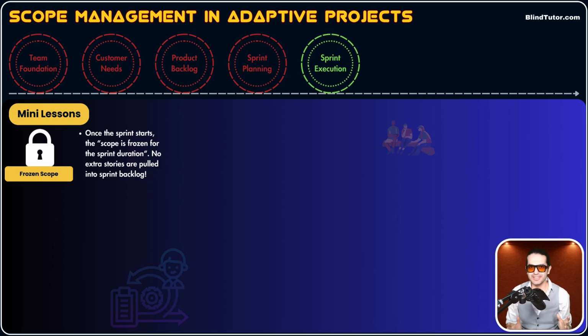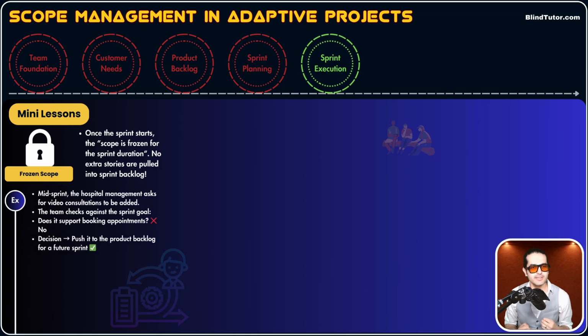Same thing is for here, for sprint backlog. It is a frozen document. Once the sprint starts, no changes to a sprint backlog. There are very, very few rare cases that, if all the team agrees, they could add a user story that is aligned with the sprint goal and is very, very critical. But rule of thumb, and 99% of the scenarios show us, the sprint backlog is frozen. No change to it. Just consider this concept for your questions.